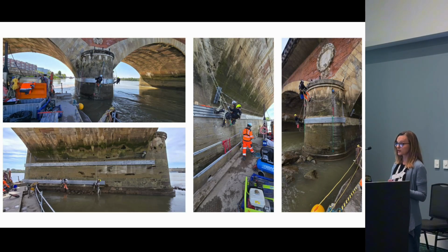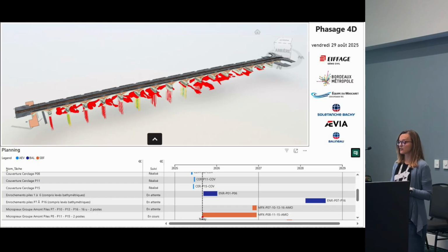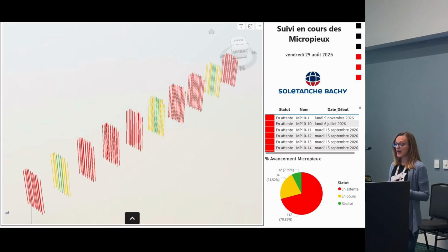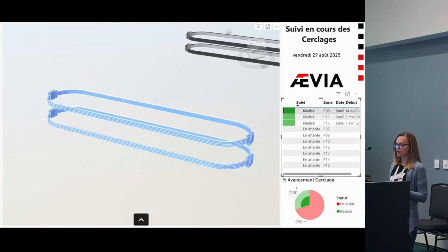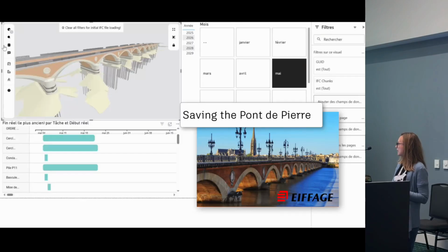And the modeling of all this is mainly done in Revit, with some specialist models also shared as IFC. And to make these complex processes more transparent and also to improve the communication, Eiffage has combined all the models in Power BI and connected them with a schedule, resulting in a dynamic dashboard shared with all the stakeholders for an easier overview of the individual stages and the timing.